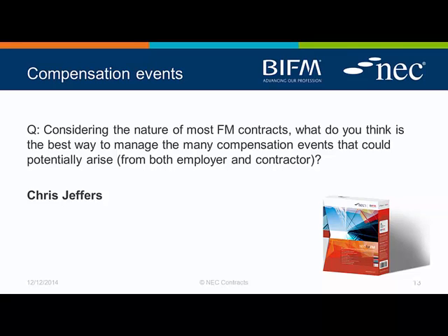I agree. I think my feeling on this one is that when you look at some of these contracts where there's a lot of change, you find that with that comes delay. Contract completion tends to end up 6, 7, 8, 9 more weeks behind where it ought to have been.